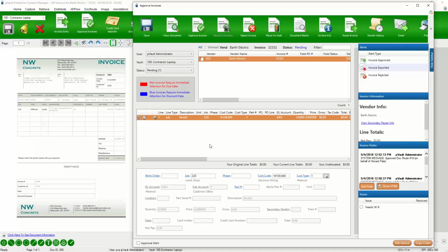That would probably stop me there and make me have to do some type of change. In fact, you can set up errors or warnings to prevent them from hitting the approve button if it is over budget, or if it's over commitment, or if it's out of compliance. Because we track all three things when you go to approve to make sure you have a valid invoice that you're sending. And compliance can have a little threshold if you want to say, you know, it's okay to go 5% above a commitment. You can make those rules within the system.